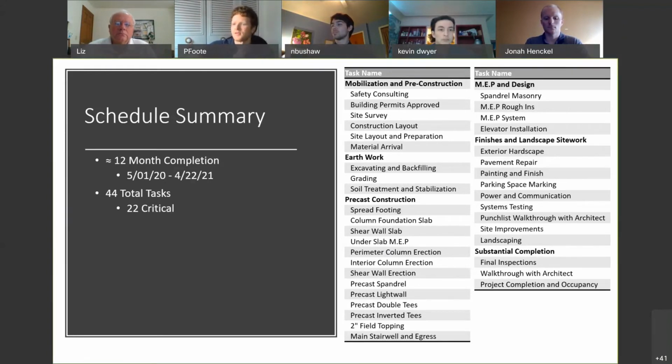The schedule has a total of 44 activities, 22 of which were on the critical path. This schedule goes into great detail on the fabrication of our precast structure, as well as all MEP, stairwells, elevator installations, landscaping, and finishes.